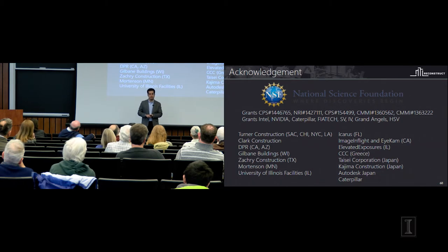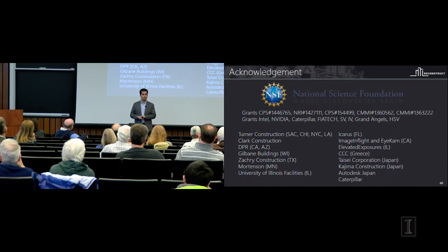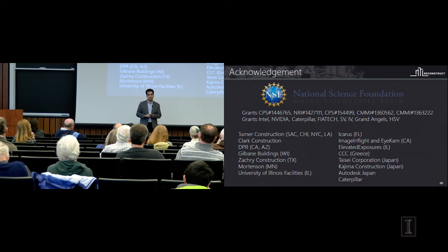We remain optimistic that regulations would improve. The biggest challenge that we have is you still need to maintain line of sight. A lot of these platforms that we have are autonomous, so you don't need to control them. But the FAA still wants somebody to be on the site, make sure that they can actually see it, so that in case of system failure, there won't be any accident. So what it means right now is that we have to have multiple people engaged in the process. The cost goes up, but hopefully over the next few years, regulation will start relaxing a bit more.